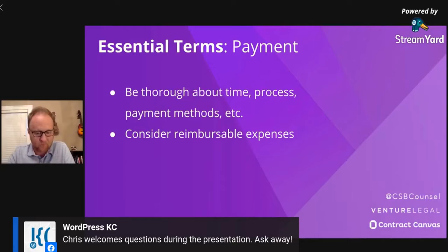And if you do ask for money up front, you should be clear about whether or not it's refundable. So a lot of times, for example, when we would do it under our web development business, we would say 50% due up front, and that 50% is not refundable unless we do something wrong on our side. But if the client decided halfway through that they're not going to finish the project for some reason, we'd at least get to keep that 50%.